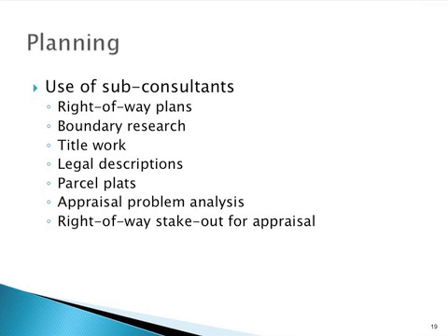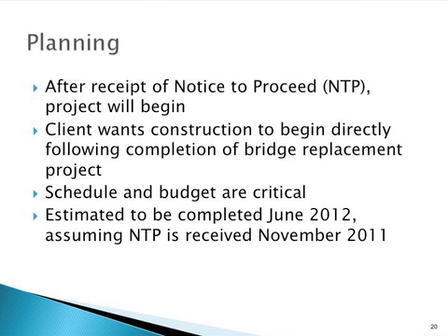Sub-consultants will be used to handle various tasks. Good communication is key in the execution of our project. The client will be updated monthly or more often as needed if questions or concerns arise. The team will communicate bi-weekly in order to track project performance, and communication will occur as often as needed with sub-consultants. The next slide discusses some details of the planned schedule.